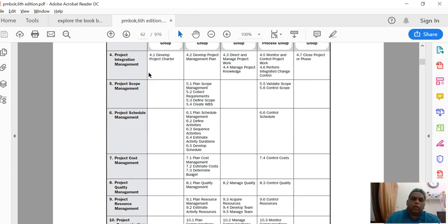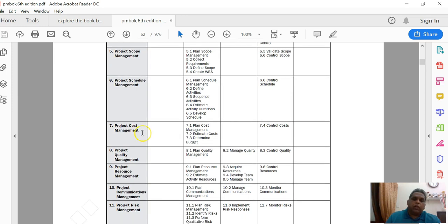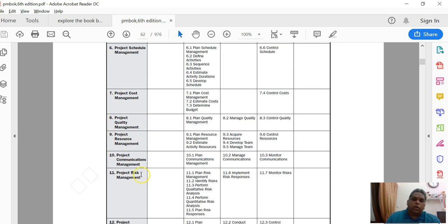Well, if the response strategy is to mitigate, so mitigation comes with an activity. Well, you got to plug in that activity in your scope, and that activity would have a defined timeline, resources, effort, and people involved, and that would definitely cost you, and therefore risk would contribute to refining your baseline further.